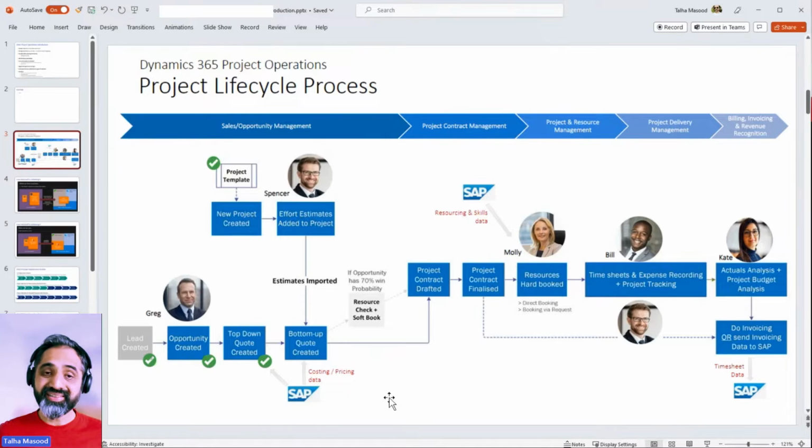There are projects in which material is consumed as well. Material consumed means we are doing construction projects, so we need to be booking in cement, we need to be booking in wood, we need to be booking in other stuff as well. And sometimes there is equipment booking as well. Again, the construction example: I have a big machinery which I want to use as a part of the construction process. I use that machinery in different projects, so I need to be booking that machinery for a certain time, because at this time it will be used in project A, and at this time it will be used in project B. So it is almost acting as a human resource basically. So all those types of bookings are made basically.